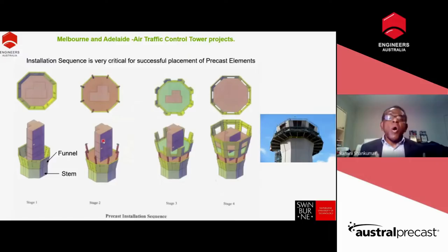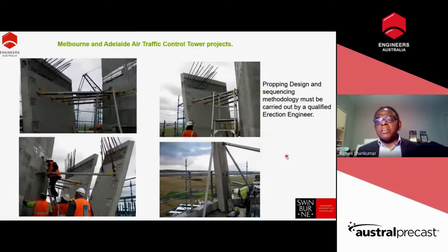We only know about the design part of it, isn't it, actually? So if you look at this one, I said the stem is a slip form and the funnel, all of them are precast, and you get a beautiful building finished in no time. And propping, guys, it is very, very crucial for safe construction. Propping design and sequencing methodology must be carried out by a qualified erection engineer. I'm separating a design engineer and an erection engineer. Very important part that we should note.